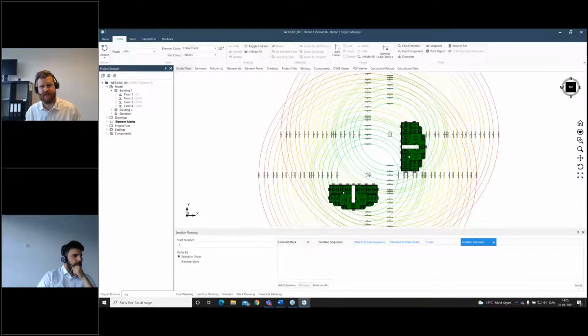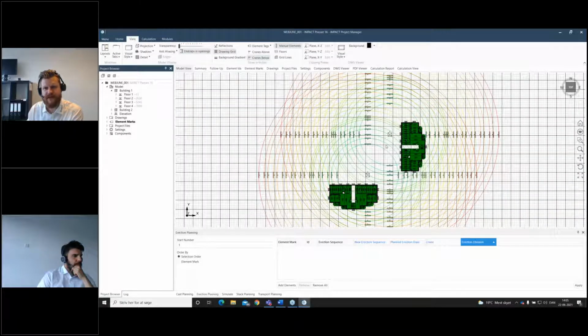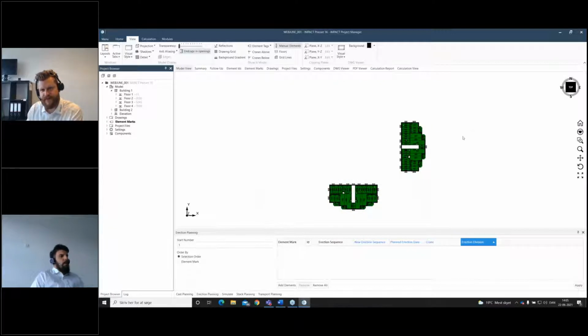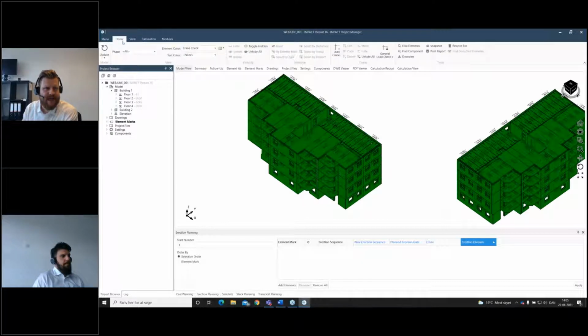So basically, you can see here, it took me 5 seconds to place some cranes, to do some crane checks. If we want to control where the cranes are, we have a grid split in meters. You can also split the cranes on where they're allowed to actually work, on floors and on buildings and so on. And also with angle degrees, right? Exactly, like Thomas says, if you have existing buildings already there, you can also work with that. So that was actually the crane.